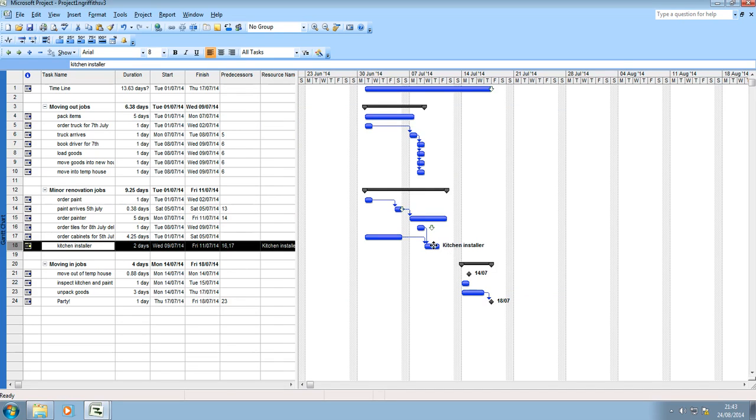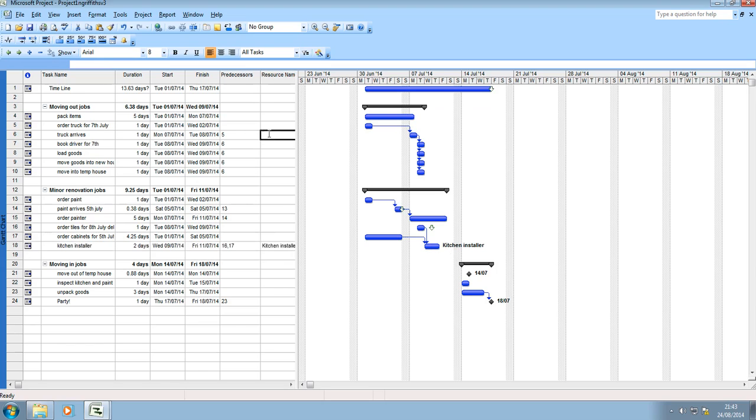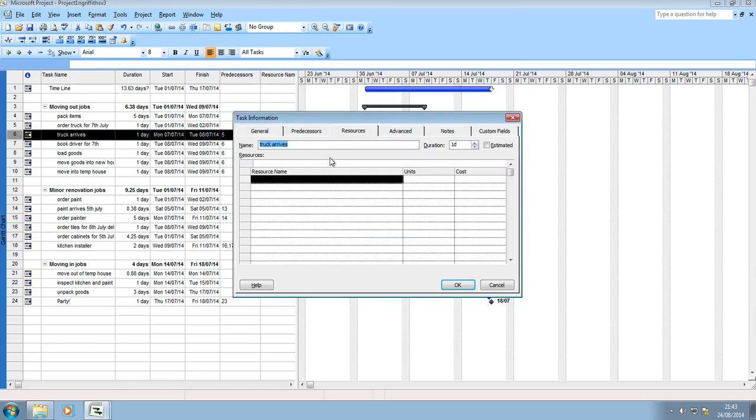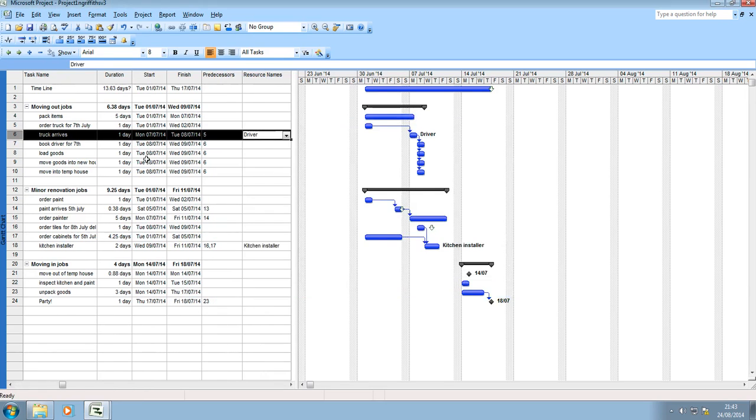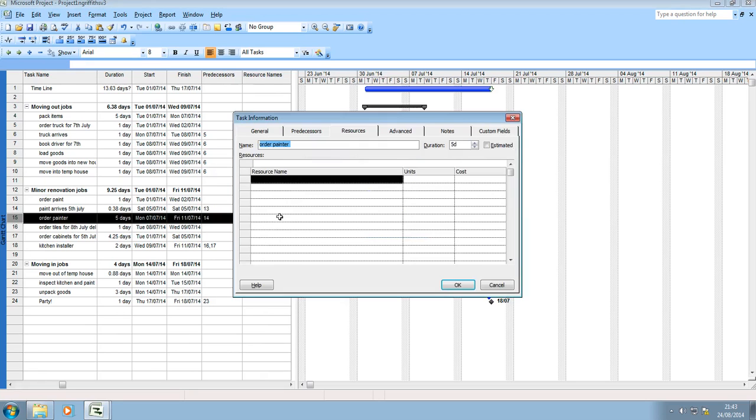The truck arrives, that's going to be the driver so I can put driver against that and again there could be a daily cost. Equally order the painter and he needs five days so I can click the drop down box and there's the painter.